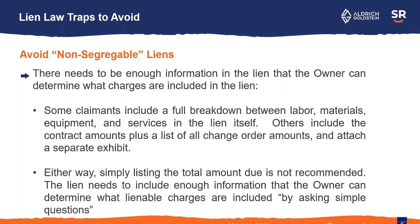The reason you want to include information about the amounts that are due — breaking it up into labor, materials, equipment, and services — is to avoid what's called a non-signable lien. If the owner can't ask simple questions and figure out what the lien is about, the court may say this isn't segregated between lienable items and non-lienable items and throw the whole thing out. That's pretty unlikely, but I would avoid simply putting an amount due without including any information. Include a breakdown if you can.